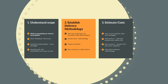For example, as we're going through and establishing the delivery methodology, we'll probably realise we've missed some scope and have to go back to step one. Whereas when we're estimating costs, we may realise we can save a lot of money by self-performing the works and go back and change our delivery methodology.